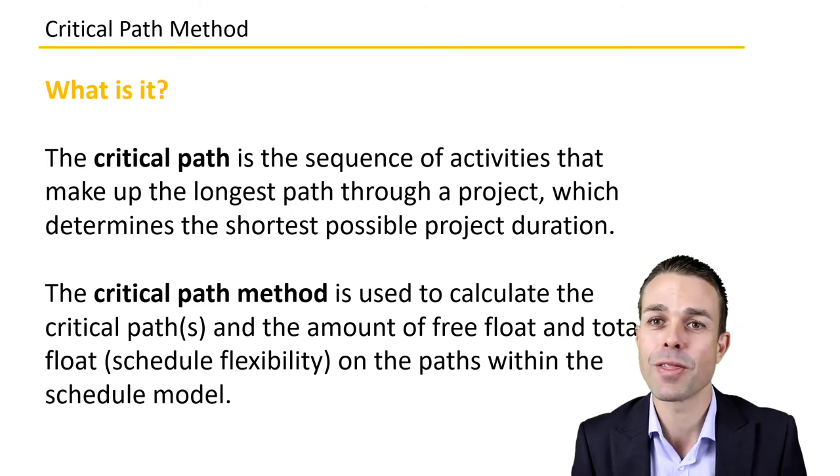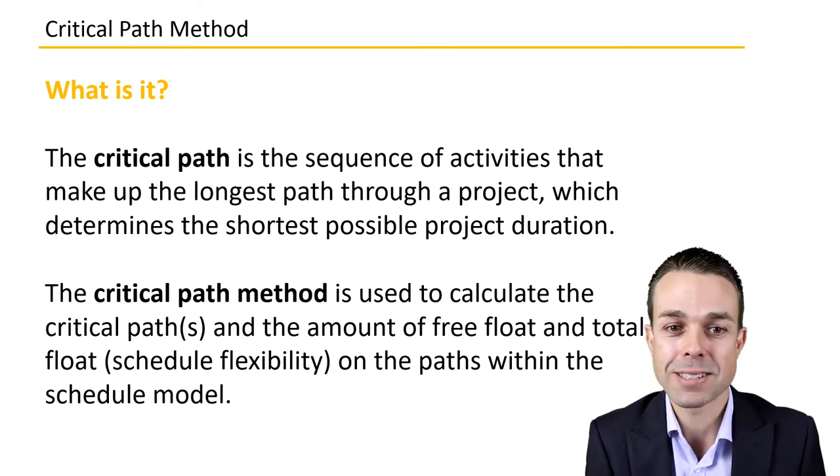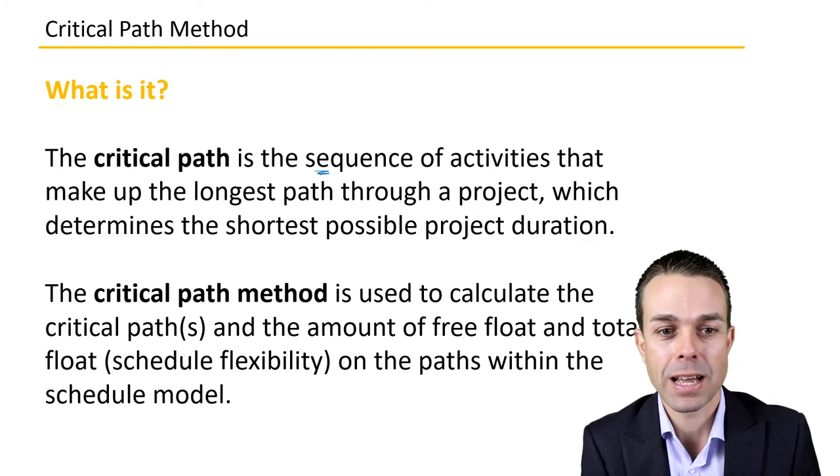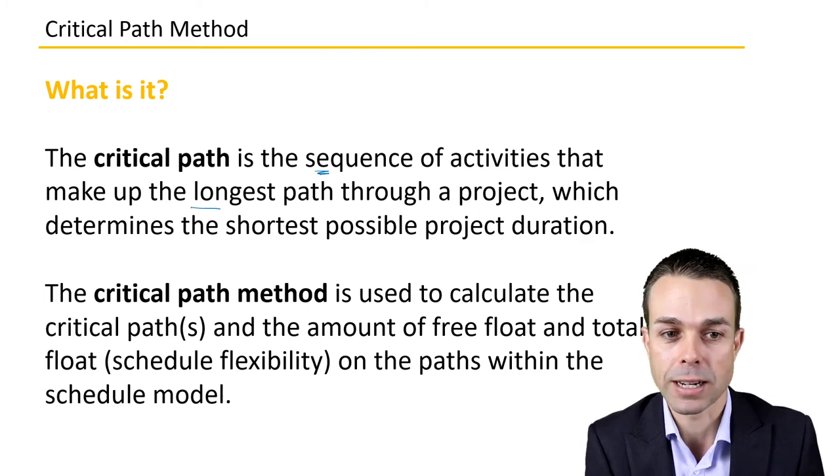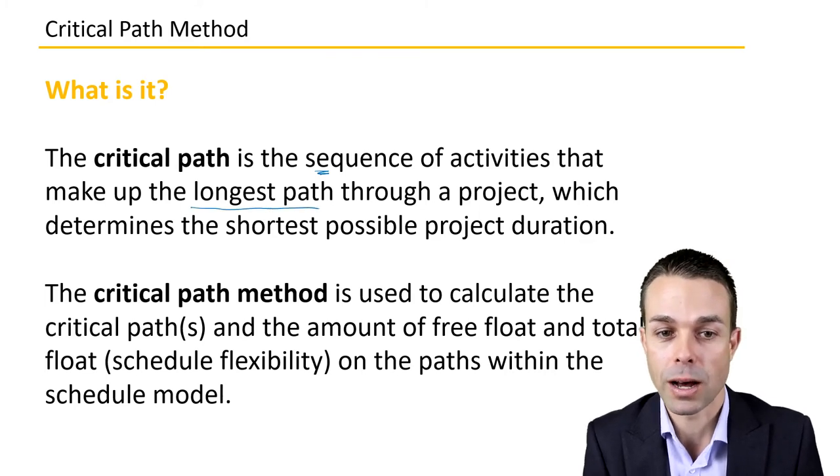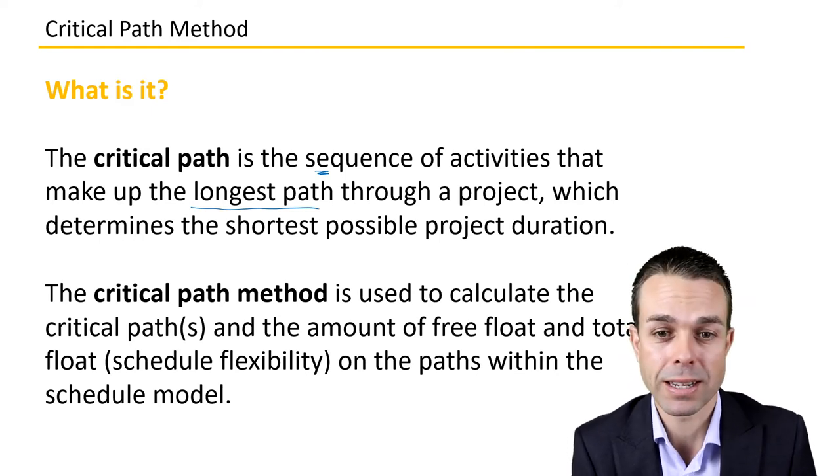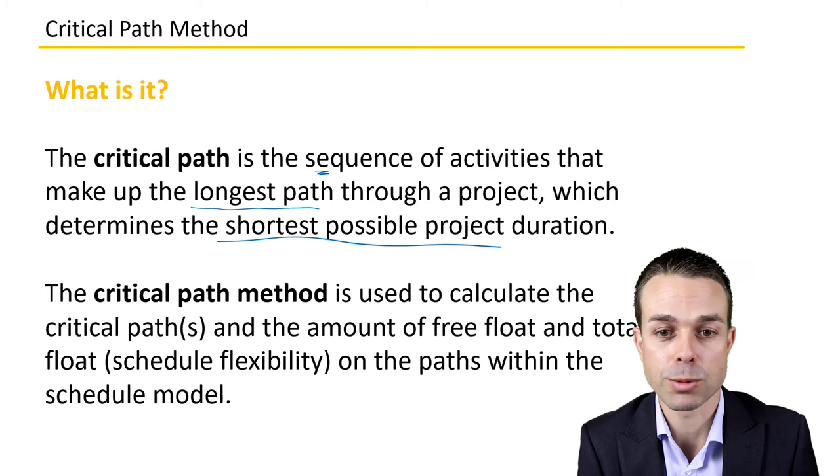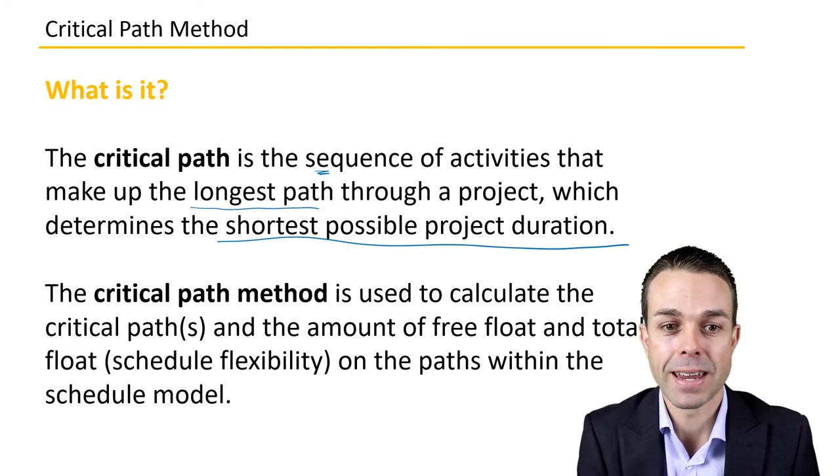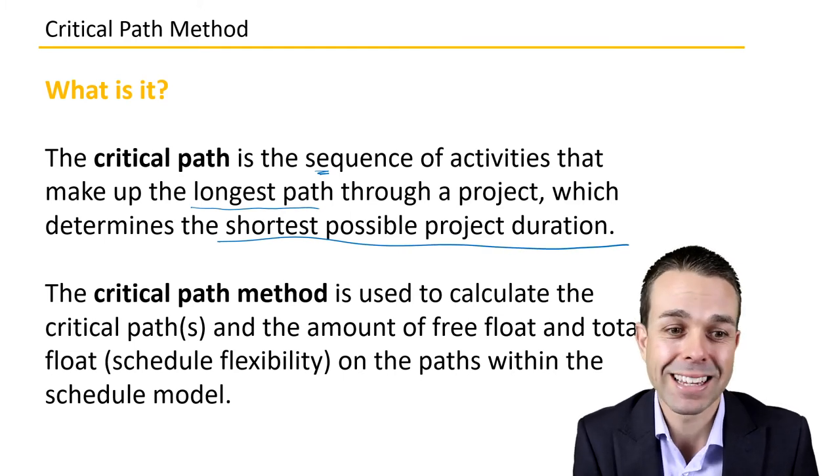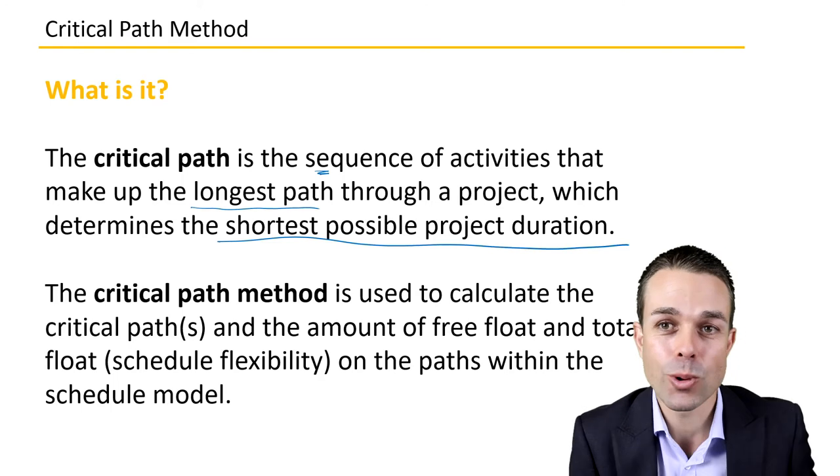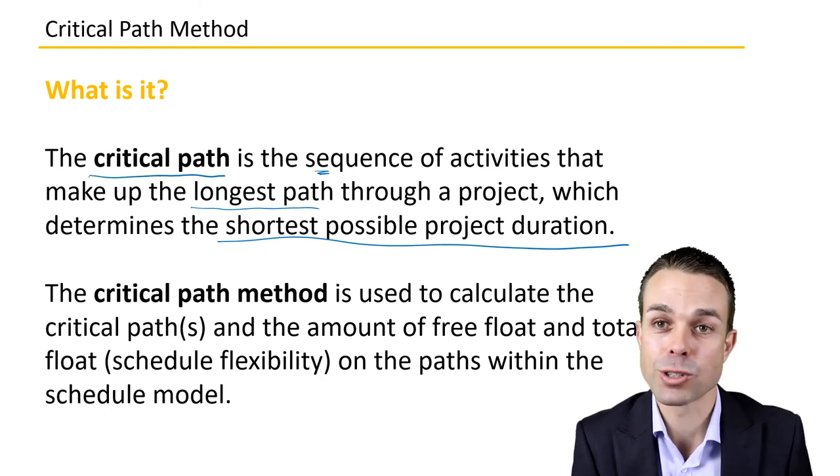So what is the critical path? Well, it's the sequence of activities that make up the longest path through a project. So the longest possible path, but that determines how soon we're able to actually complete our project. So the shortest possible project duration. Now it's the path that doesn't have any slack in it. So there's no leeway and that's why it's the most critical path.